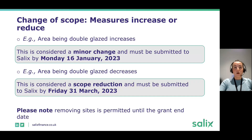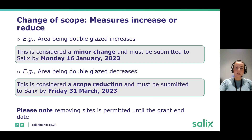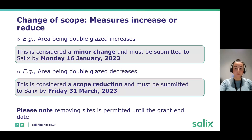Removing sites is permitted until the grant end date. It's only adding sites to the project that is not allowed at this stage, but removing sites is allowed until the grant end date.